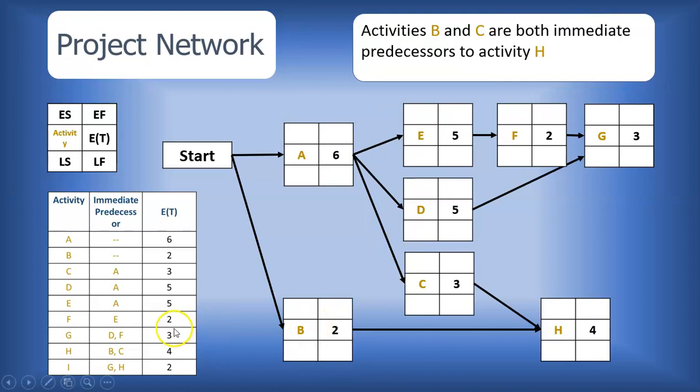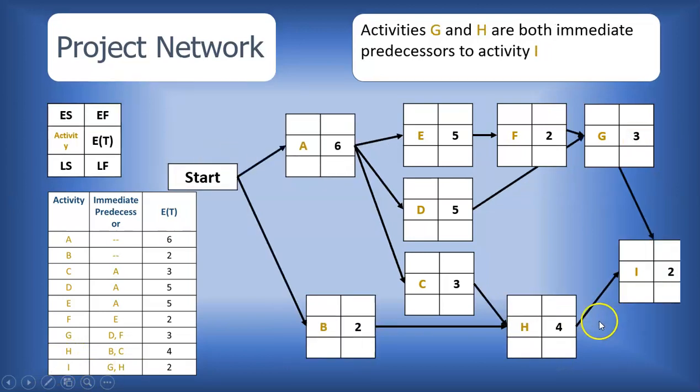Last but not least, we have activity I, which immediately follows activity G and activity H. So of course, we will have arrows coming from both activity G and activity H to activity I.